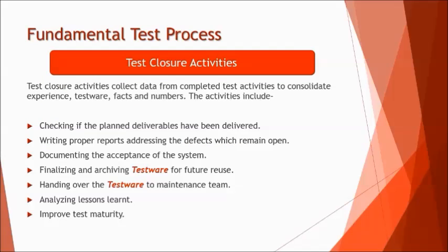So the last stage of the fundamental test process is test closure activities, where these activities are conducted once you call off that your testing is all over, I have passed on all the artifacts to the maintenance team, and maybe to a certain extent I can also say that the release would have taken place. But parallelly, let the release take place and you conduct your own retrospective, and we call it test closure activities, where you make sure that you have delivered all those planned deliverables.